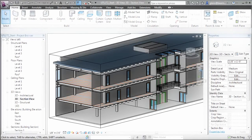While the convenience of using these multi-layer elements works very well for design modeling, it starts to break down a bit when we consider using BIM models for construction modeling. In particular, treating all of the layers as a single element creates inaccuracy for construction planning, because the layers of the wall won't be assembled as a single unit — typically the structural layer will go up first, followed by the finished layers being applied at a different time. It also creates inaccuracies for quantity takeoffs.